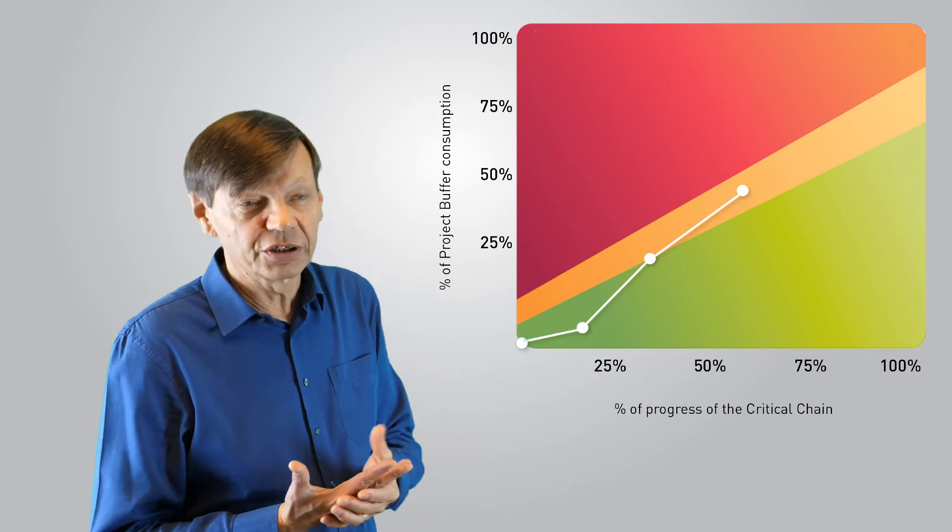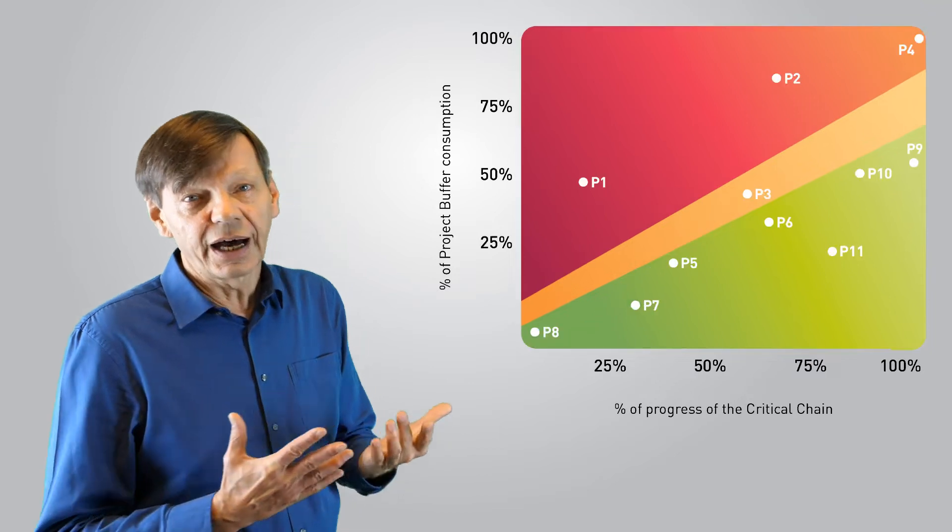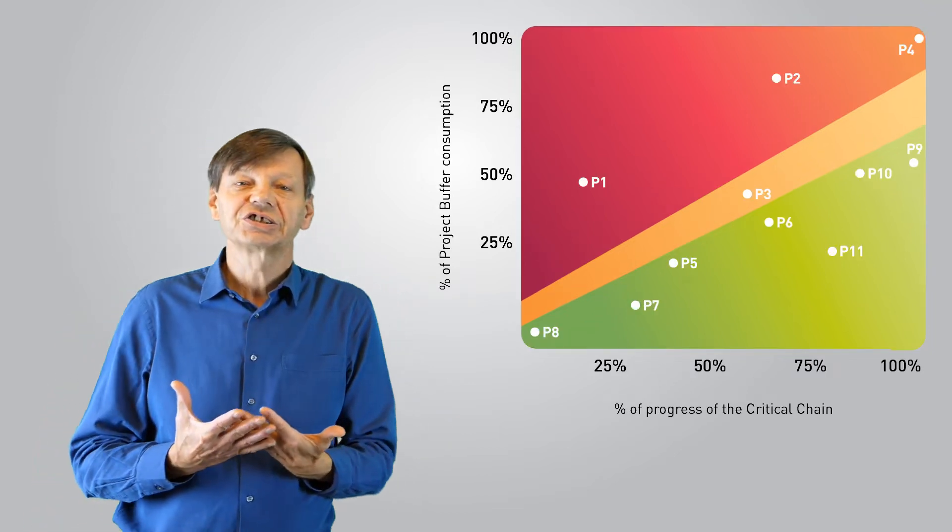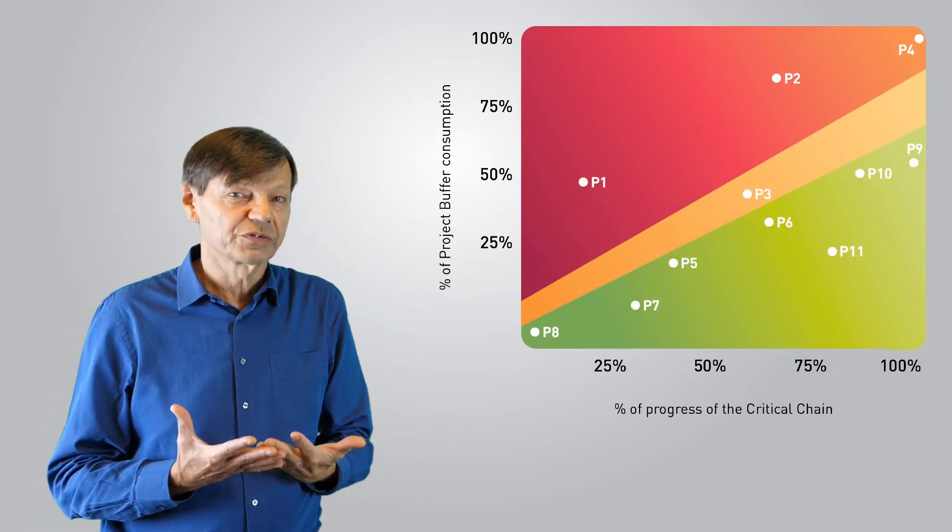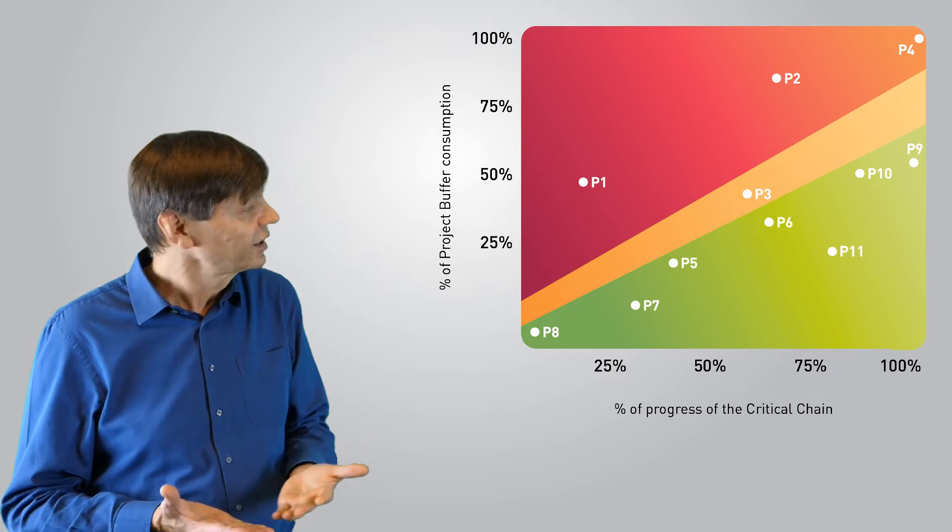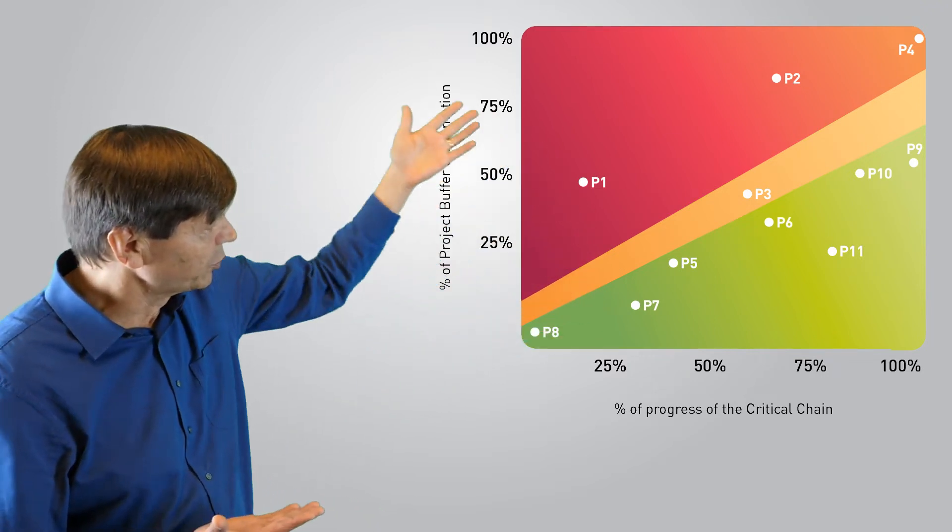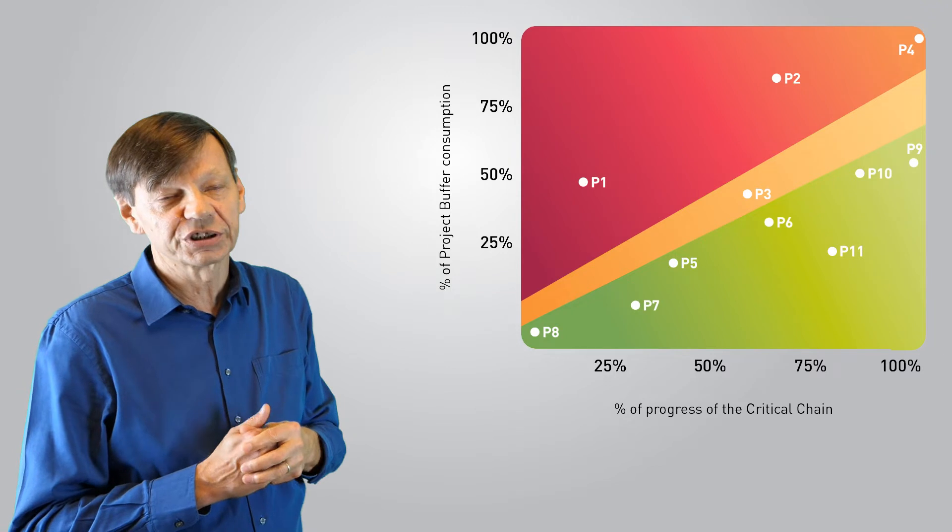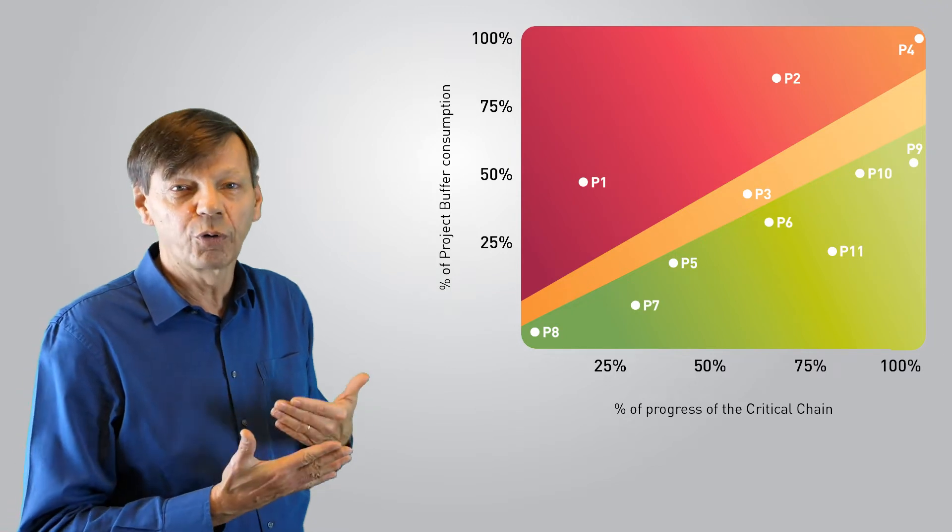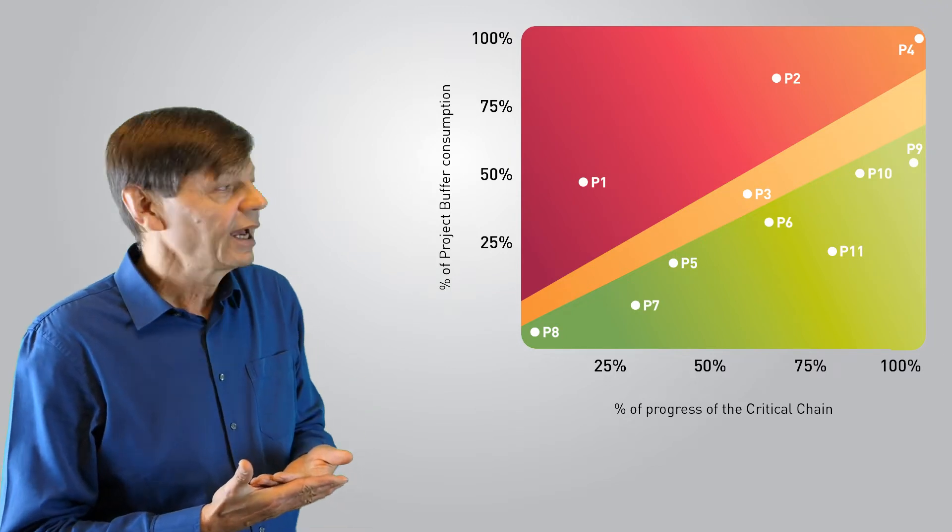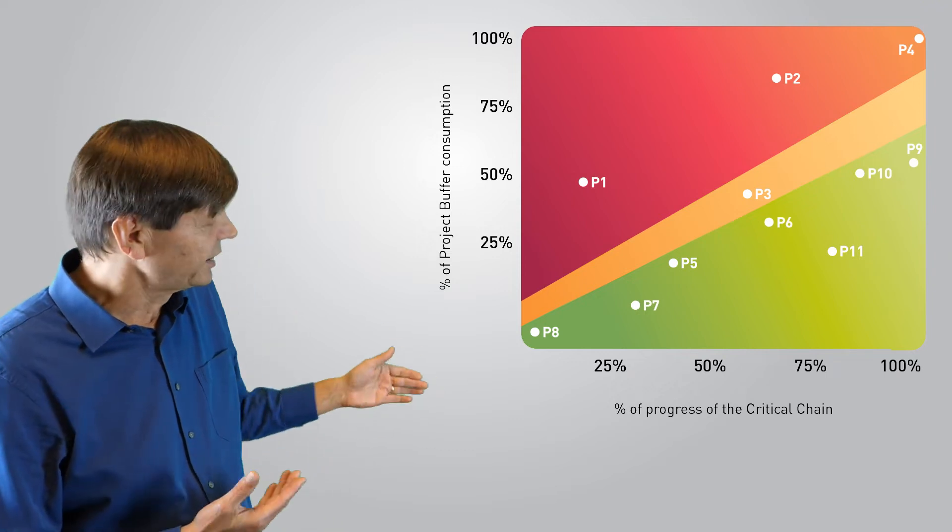Now the portfolio fever chart is just the concatenation of each of those on one page. So we have here this example with a number of different projects that are on the same portfolio fever chart, and you can do that very easily because as I said, it's expressed in percentages, from 0% to 100%.